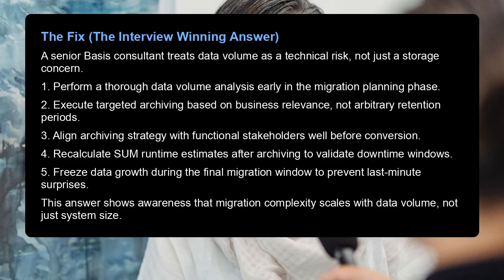1. Perform a thorough data volume analysis early in the migration planning phase. 2. Execute targeted archiving based on business relevance, not arbitrary retention periods. 3. Align archiving strategy with functional stakeholders well before conversion. 4. Recalculate SUM runtime estimates after archiving to validate downtime windows.